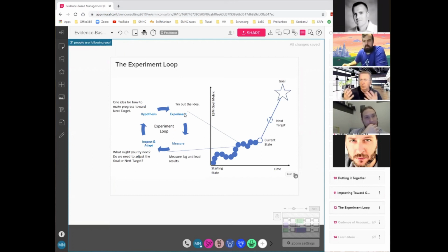So we kind of end up with three options, right? Hey, we're on the right track. We should continue on that path and really push forward with this. Maybe now let's get more teams to do the pair programming or the peer review. Or, well, we got some good results, but I think we need to make an adjustment, right? Instead of having all these people spend hours to find two issues in our environment, maybe we just need one person to review and see what they can find. Let's try that as a new experiment to see if we get better results with that before we try to expand. So adjust what we're doing.